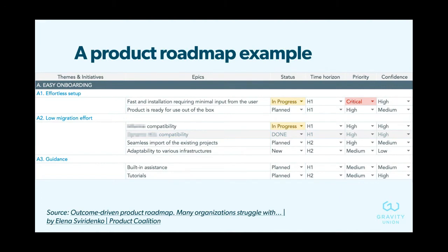So this is from my product experience. I took this example from the internet because I'm not allowed to share any sort of product roadmaps I've worked on. But it's very common, and I'm finding it more common for companies and organizations to share how confident they are in delivering things on a roadmap. So you still have themes and buckets of value essentially that you're communicating in the roadmap. You have very specific items you might be listing. And maybe it's a live roadmap. You're keeping it live with status. You're sharing if it's in progress or not. And you're sharing what timeline you expect to deliver something.